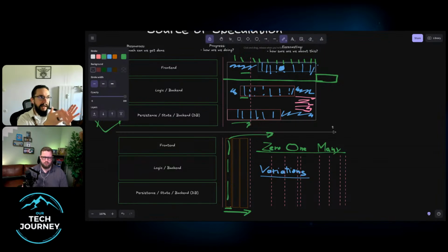I would always say, if requirements change significantly, just abort all unreleased work and take that as a lesson. Take it on the chin and abort it. Don't assume that it's going to be finished, and ask yourself, oh, we did that because we thought it was simple and quicker, but it wasn't.